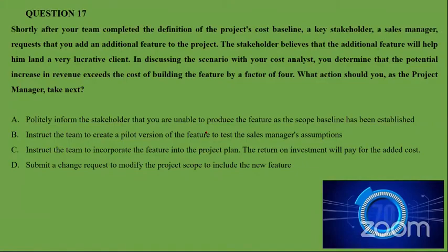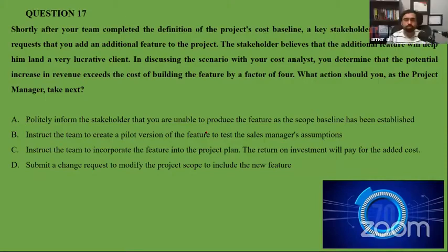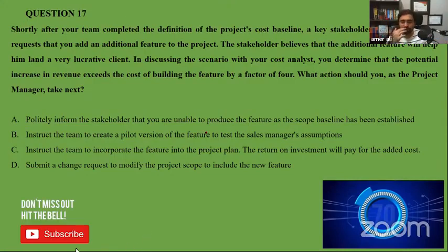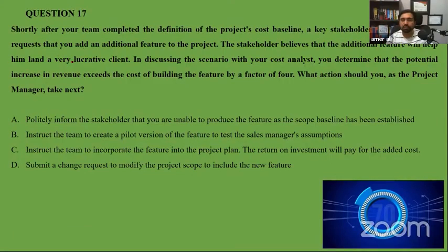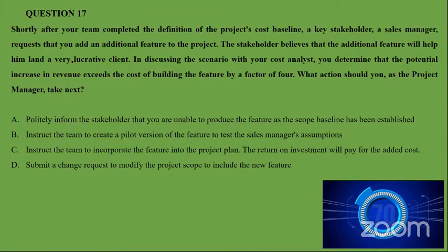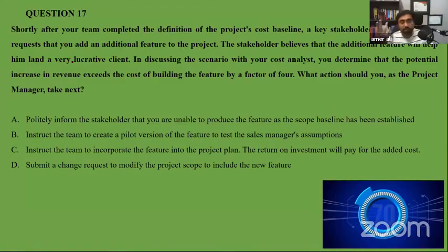Yes, Gaurav. In this question, in which case can the project manager deny the stakeholder's request? The project manager should not deny the request. She should let the request come and then work on it. The stakeholder believes the additional feature will help him land a very lucrative client, so you need to work with them. Multiple stakeholders can bring several features, but if they are bringing that, you bring it to change control. Then let the change team decide.